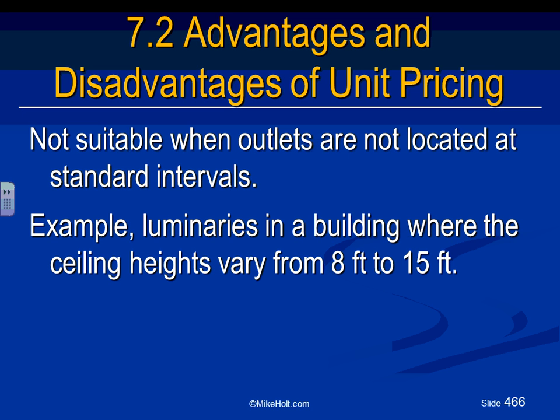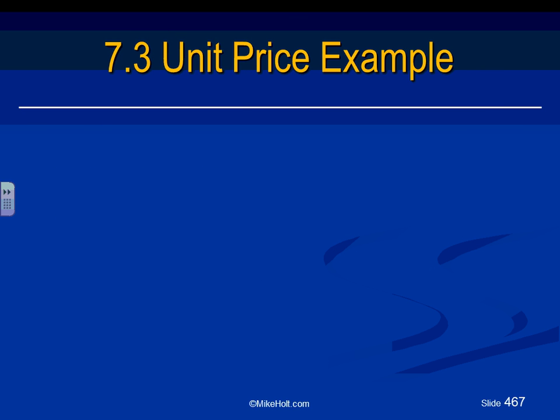Luminaires in a building. For example, if you're doing an office building, a unit price for an office floor, and you're giving them a bid of $13 per square foot for the office floor, that's kind of your unit price. So if the height of the ceiling is different than the typical 10 to 12 foot ceiling, guys, then that will affect your labor as they install these fixtures at a higher altitude.